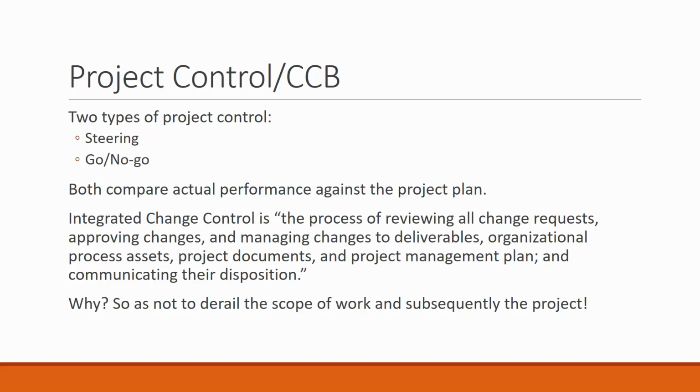Integrated change control, we've talked about this a little bit in the past, but we understand that it's the process of reviewing all change requests that come forward for the project. And it's really about having a formal process in place for bringing changes forward so that we can review them, approve them, and manage them, meaning how will they impact the deliverables? How are they going to impact the schedule? How are they going to impact our costs? And having an opportunity to approve these changes and then make sure that we get extra schedule or extra money budget to manage the extra work that's being done.